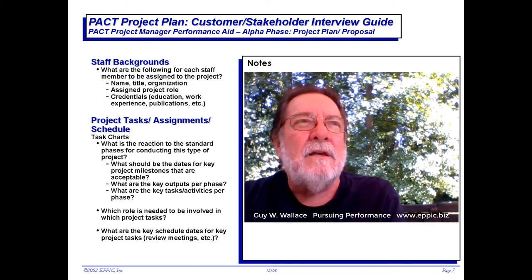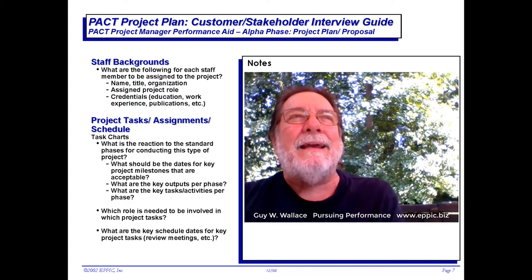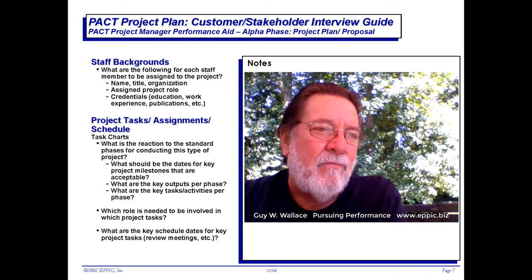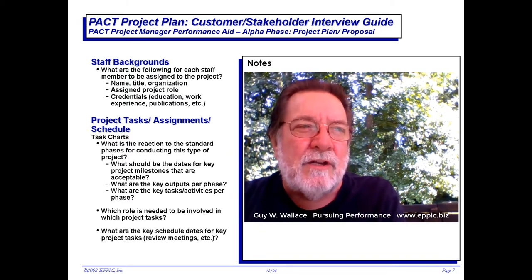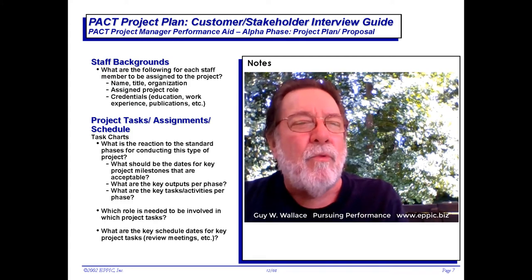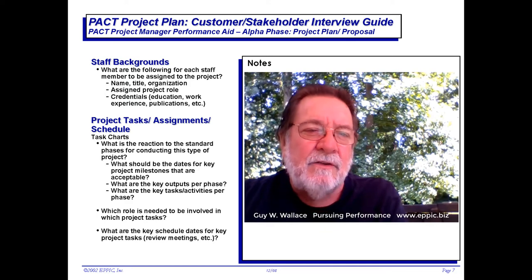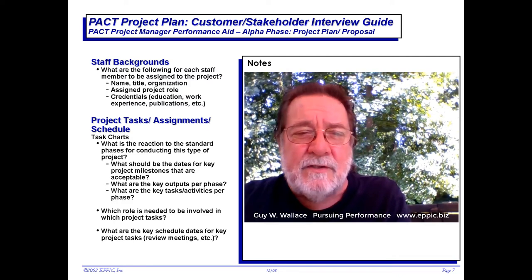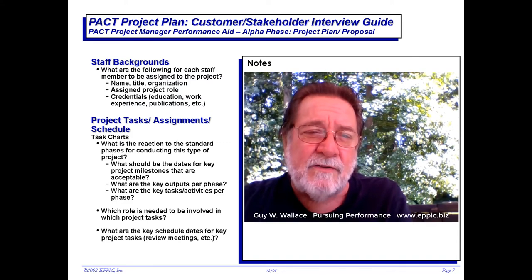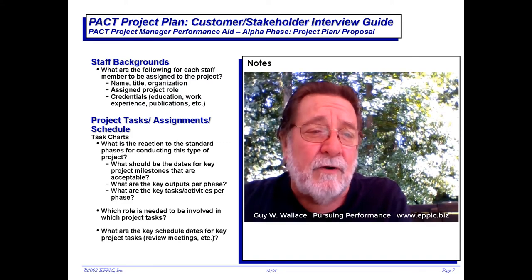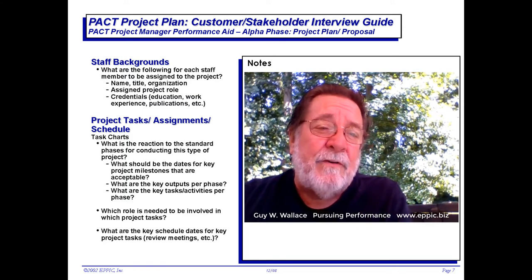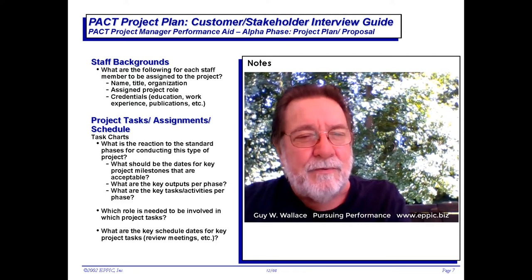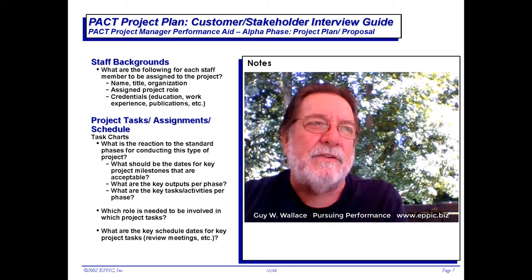When figuring out task time, we'd give more task time to the rookie than to the seasoned veteran. With cycle time, if a task takes a seasoned veteran one day, we might give the rookie two days — plus more time for reviews and updates to get it closer to the mark. We need to give more touch time and cycle time to the rookie than to the seasoned veteran. It's also helpful to understand who's going to be involved — maybe you as the one taking the request get to make those decisions, or maybe that's an organizational decision you don't get to make.